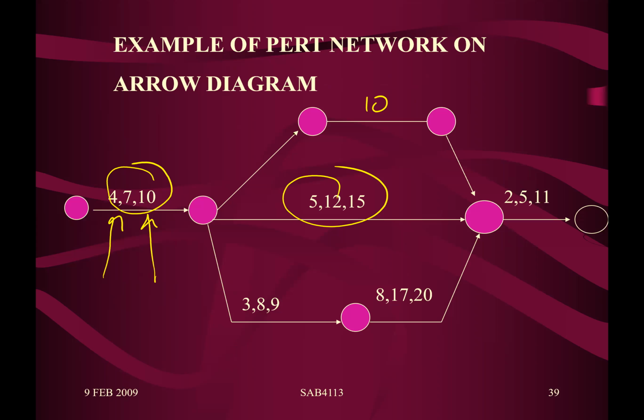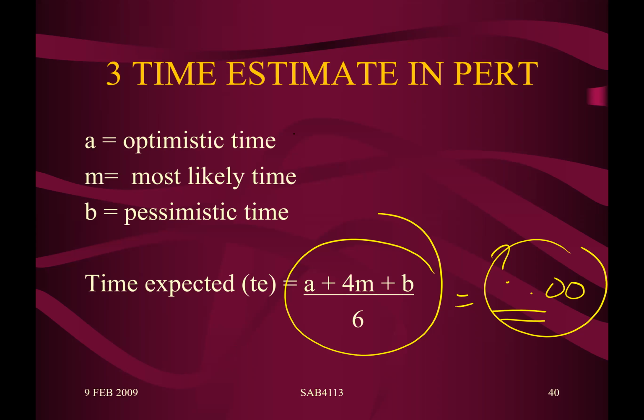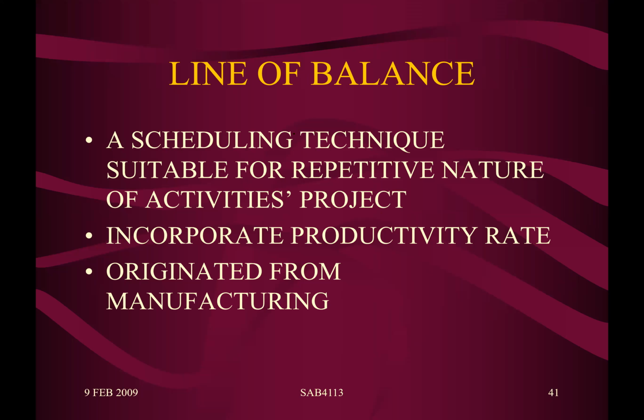But nowadays, most construction projects do not really need to use a PERT diagram anymore, because we can calculate the timing of each activity quite accurately, as we might have all kinds of figures and data available.